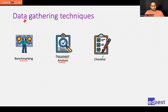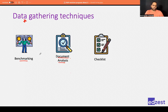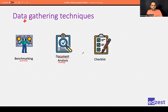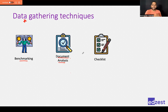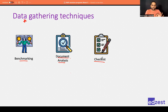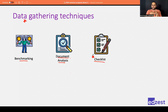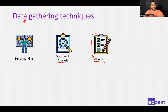Then we have checklists. Whenever you are gathering data, you will be talking to people and using documents. You need to be sure you've discussed all the required points. A checklist provides a great opportunity to ensure that uniformly everybody is asking the same questions to stakeholders. If someone leaves and someone else joins the project, they will always be asking the same points mentioned in the checklist, making data gathering uniform.